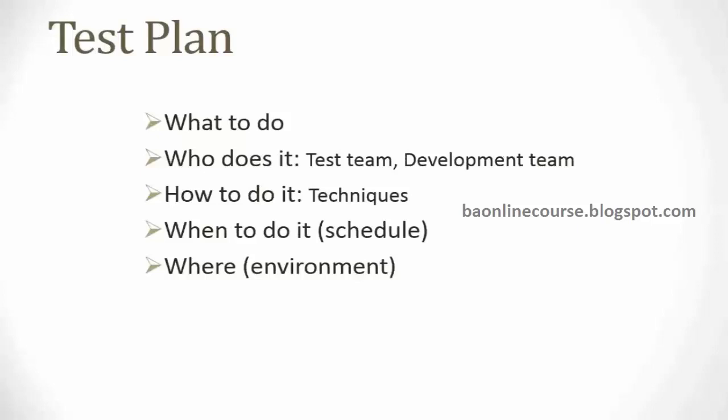A typical plan consists of what to do. It comes up with the work breakdown structure, similar to what you have prepared for the requirements. A QA person would prepare it for the testing. You will also identify the people involved, so that's another component coming out in your project plan. What techniques do you use? Again, you could use a black box technique or a white box technique, or some tool-based technique. If it's performance testing, then they would have some more techniques, or if it's security testing, there would be some additional techniques. So you'll figure out all of them and list them down here.